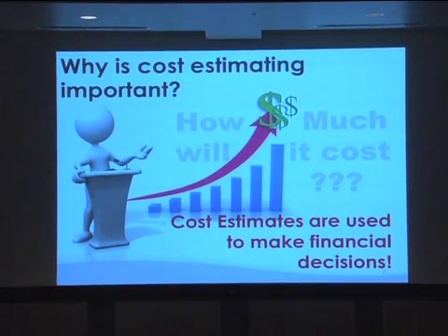And the other part that is so very important, that I want to emphasize as we're going through here, is to keep your cost estimates current, okay? Very often when I've been brought in to review a project, the project's at 60% design and the cost estimate's back at 30%. I never quite understand that, because the cost estimate in some ways is more important than your design, okay? Because without it, it doesn't go to the street.